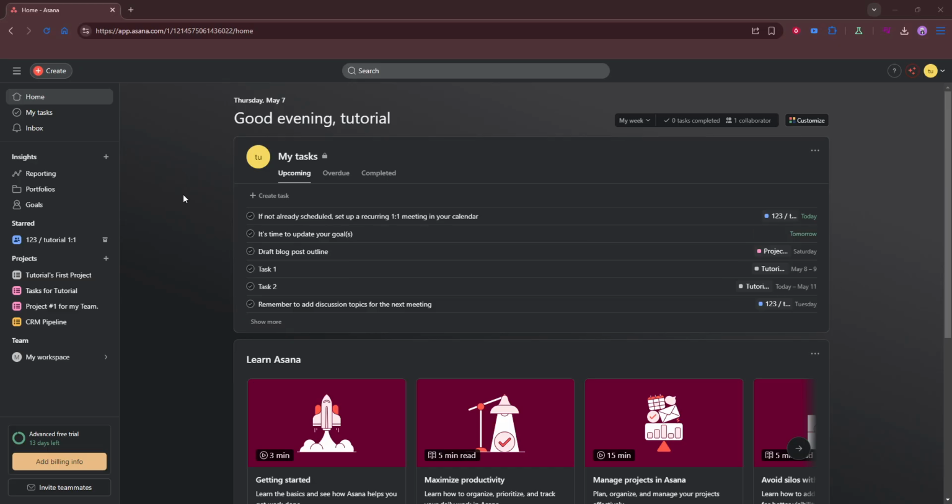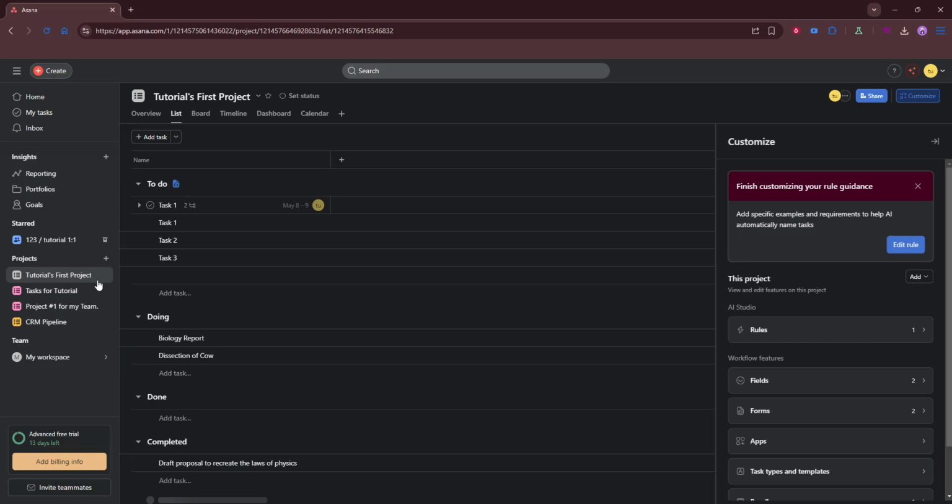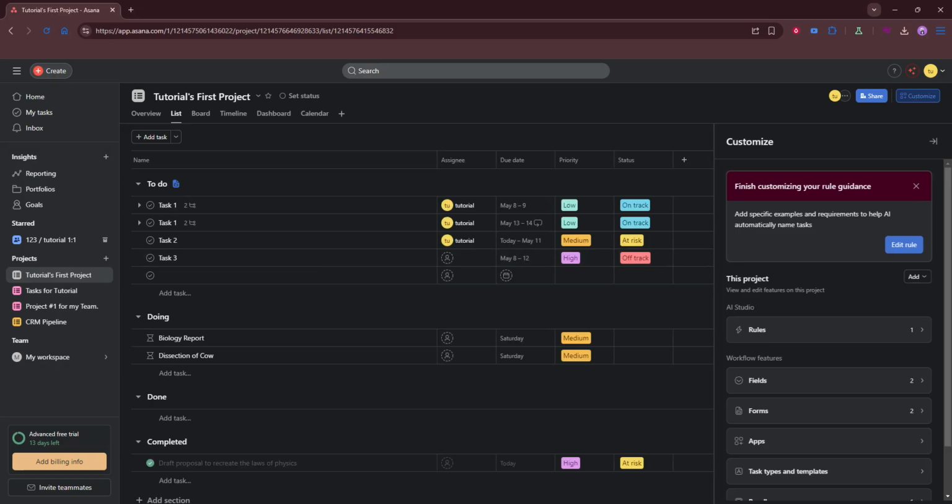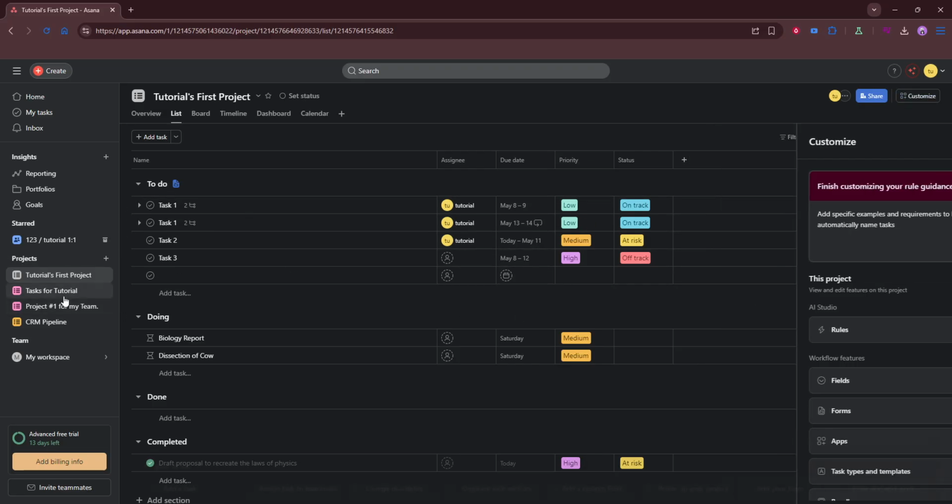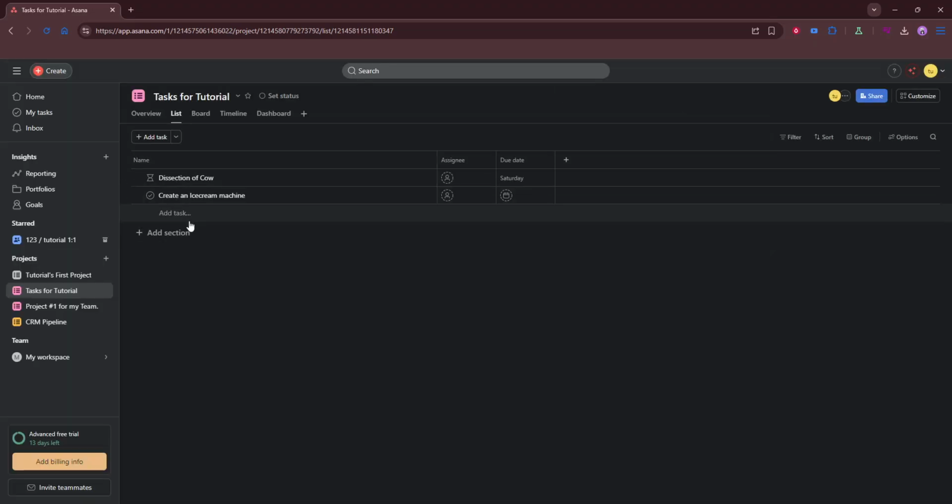Next, structure the project with sections that mirror the planning stages: venue, budget, guests, marketing, and day of tasks. Think of these as buckets that prevent details from getting lost. Venue covers everything about location and logistics. Budget holds costs, approvals, and payment timing.